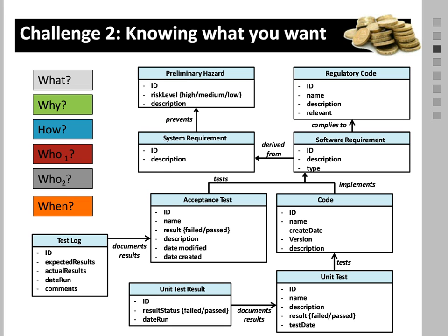So what value will it bring to us if we collect the data in order to answer these questions? How are we going to collect the data? Who is going to collect it? Oftentimes with traceability, the effort of collecting the data is exerted by someone that is not the beneficiary of it. So we need to understand this. Who's actually going to use it, and when is it going to be used? These are important questions. I've visited a number of organizations, and on one occasion, the software developers told me that they had very extensive traceability in place, but they didn't actually know how to leverage the trace links and how to query it to support anything useful in their project. So we have to ask these questions as part of the planning process.